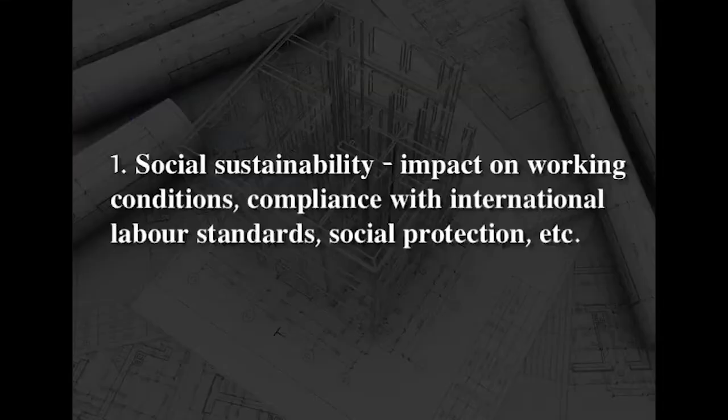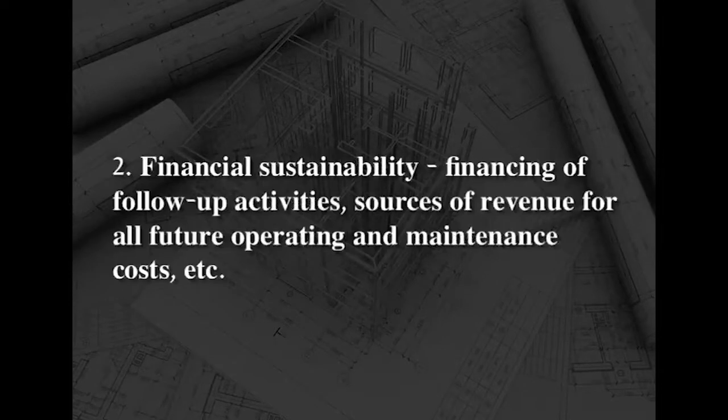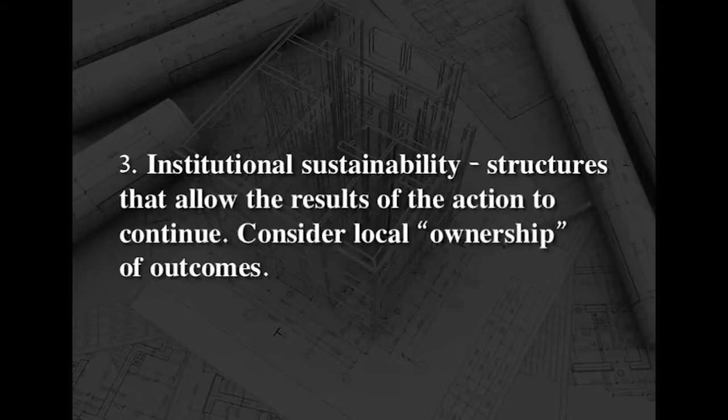The core elements of sustainability are social sustainability, that is, impact on working conditions, compliance with international labor standards, social protection, etc. Financial sustainability, financing of follow-up activities, sources of revenue for all future operating and maintenance costs, etc. Institutional sustainability, that is, structures that allow the results of the action to continue.